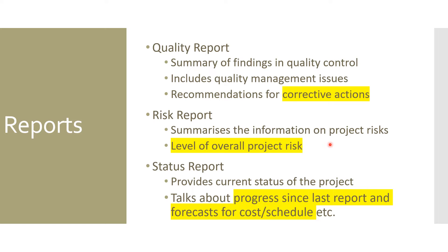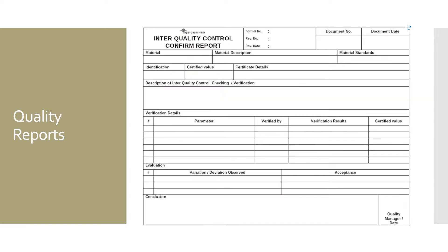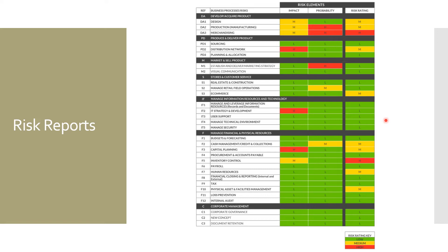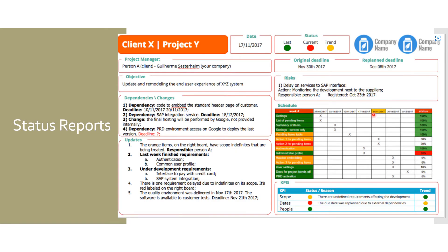The third report is the status report, a very common report in any project. It provides the current state of the project, talks about progress since the last report, and gives a forecast for cost and schedule. Here is a sample quality report showing quality information, verification details, and evaluation details. We also see an example of a risk report summarizing risks with risk rating, impact, and probability. And this is a sample status report for a client, showing schedule, dependencies, objectives, risk updates, and KPIs.